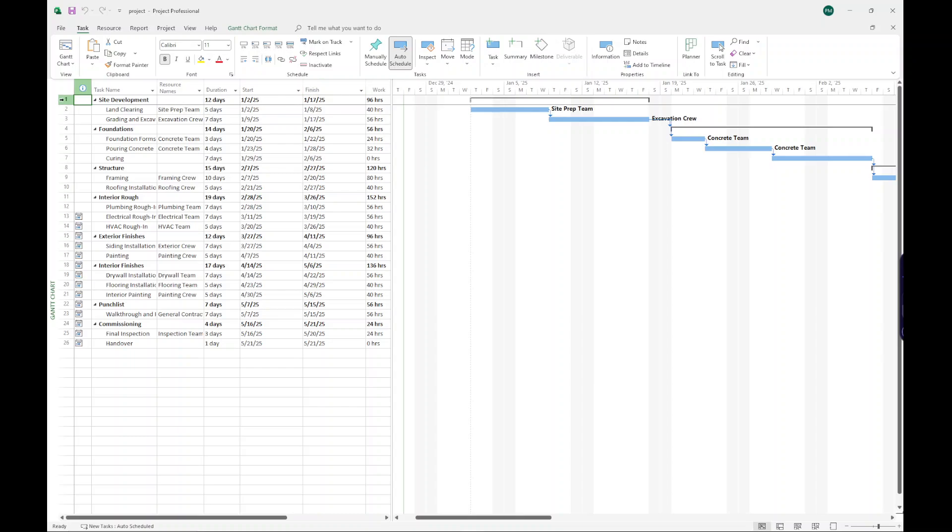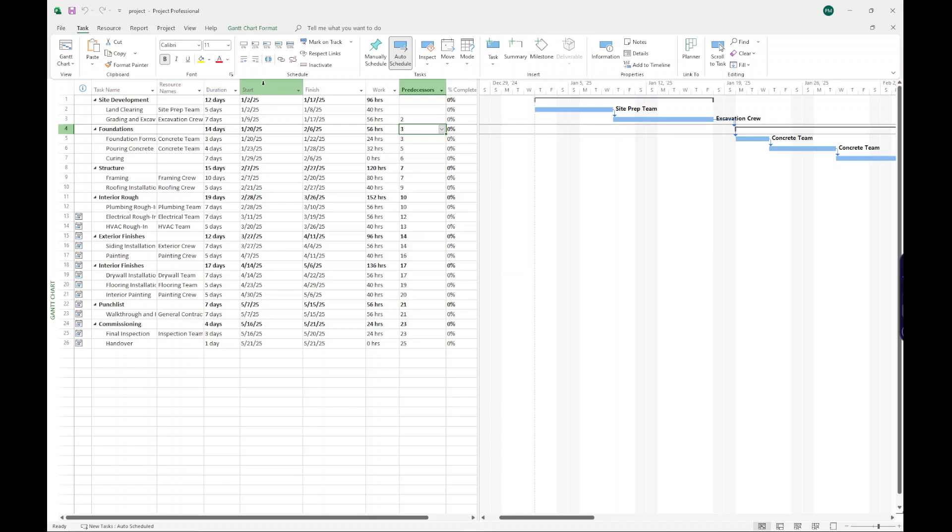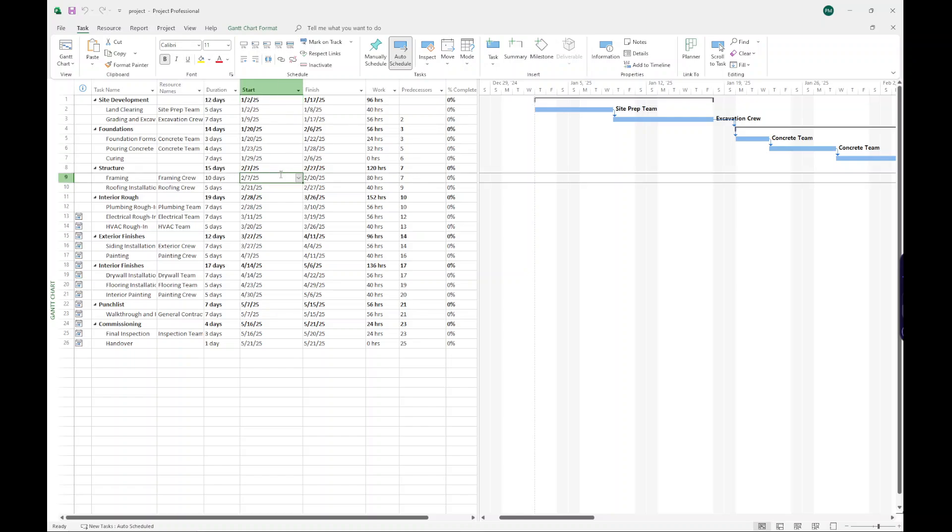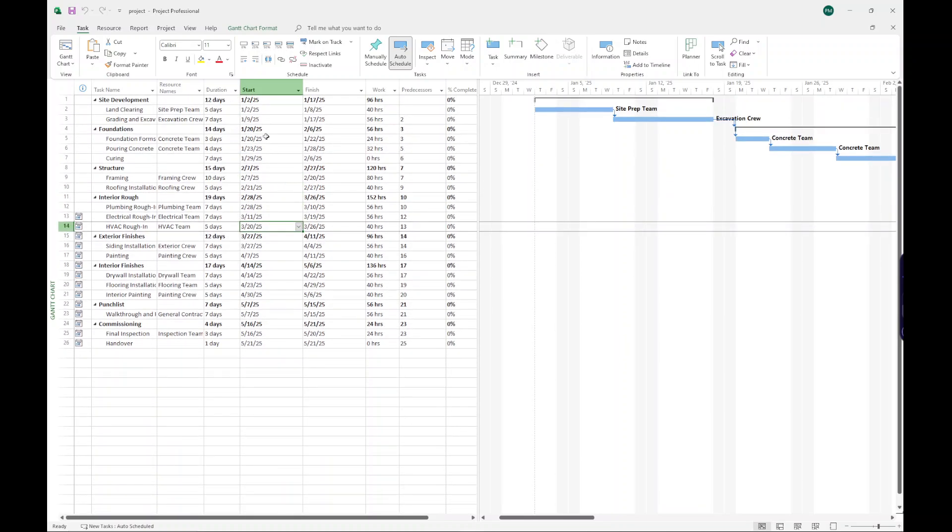We have the summary tasks. We have the activities underneath. Everything you can see is tied together. So this looks good. One thing that I will say is sometimes the fields don't map. You'll have to manually map them to the columns, to the correct fields in Microsoft Project. So you can do that just by opening, when you open the file, it takes you through a wizard and you can map those to the right place, but you shouldn't have issues doing that.